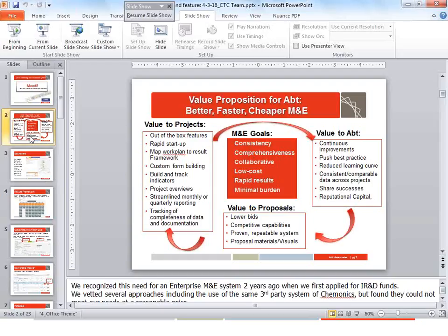The other piece of it is to be able to track our actual results. There are different levels of results. We call them indicators, but there might be high-level results, like this project is trying to reduce infant mortality, and you want to be able to put in, from some outside source, that yes, the target was to reduce it below 10% in a particular region. It is 8% in this region, 11% in that region, and 12% over time.